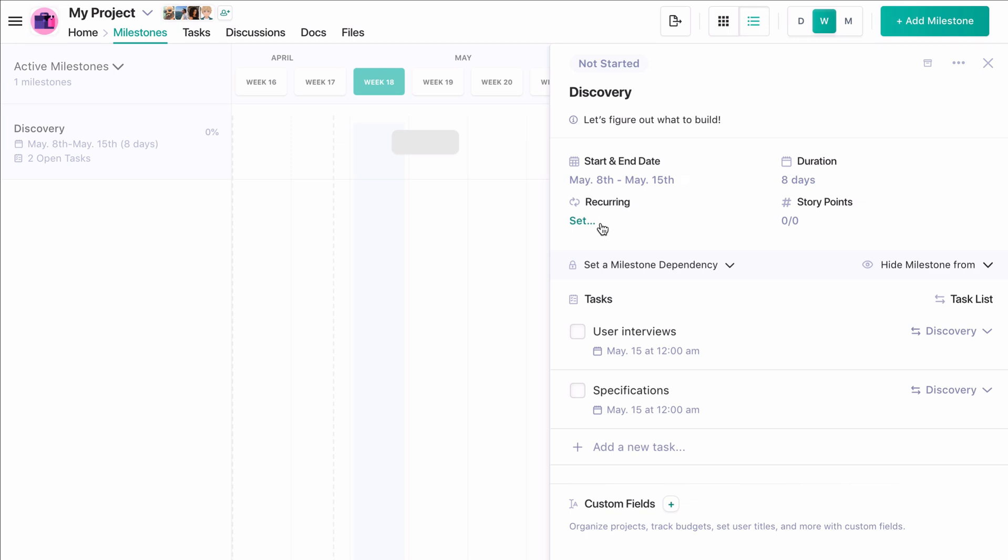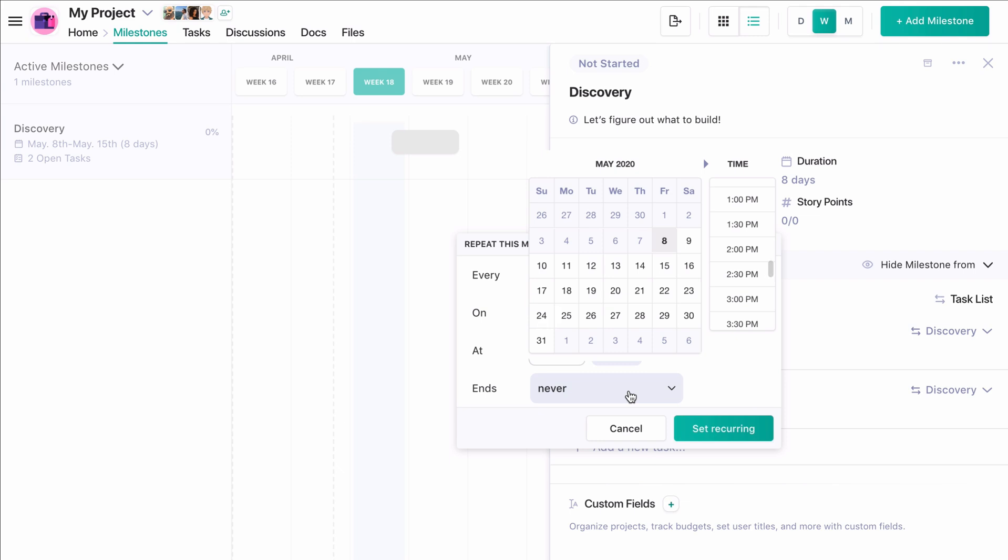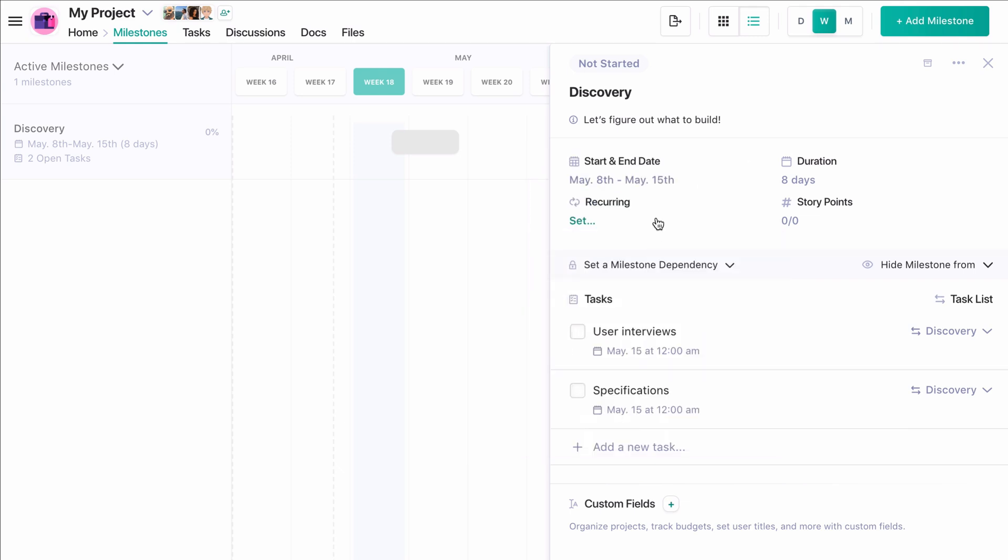You can set a milestone to recur based on date parameters. So, for example, we can have a milestone recur every Monday at 9 a.m. forever. Or, if we'd like to cap how long it recurs for, we can put an end date. This is a great way to automate sprint creation for weekly or biweekly sprints.